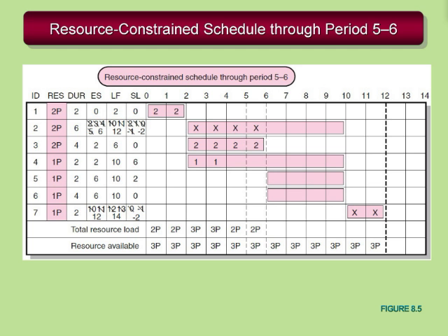The impact immediately is that the project will take 2 days longer, and that's what's represented by this shot right here. We see activity 7 had 0 days of slack, and as a result of delaying activity 2 by 4 days, we're going to lose 2 days in the project. So when can we schedule activity 2? We can't schedule activity 2 until activity 3 is done. Activity 2 will not be scheduled until the beginning of day 6.